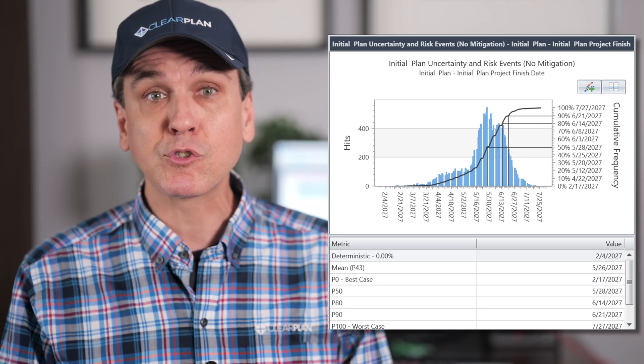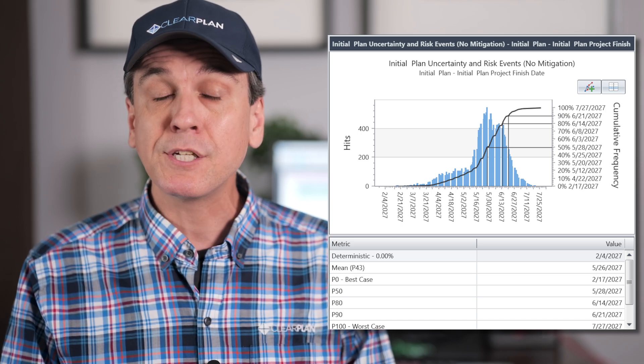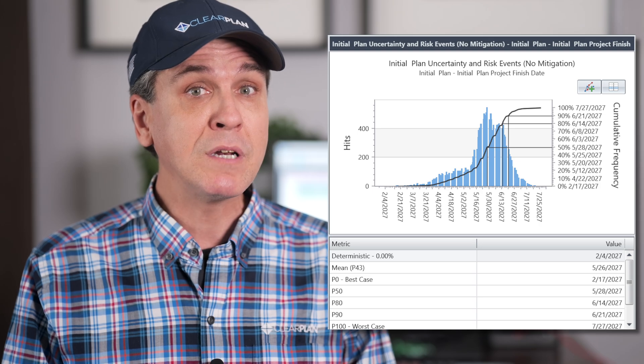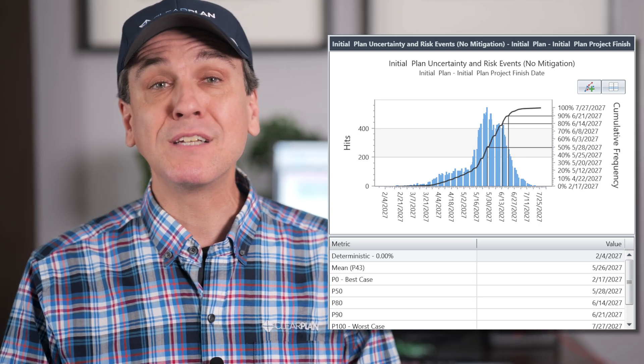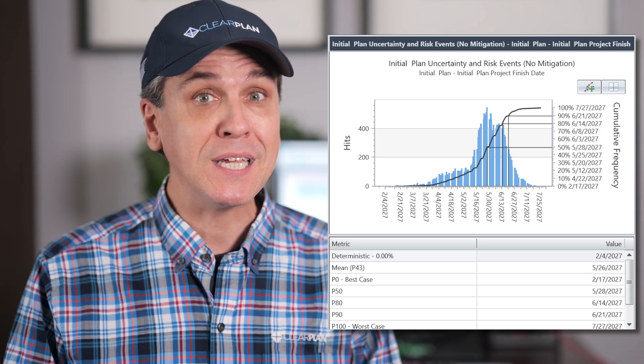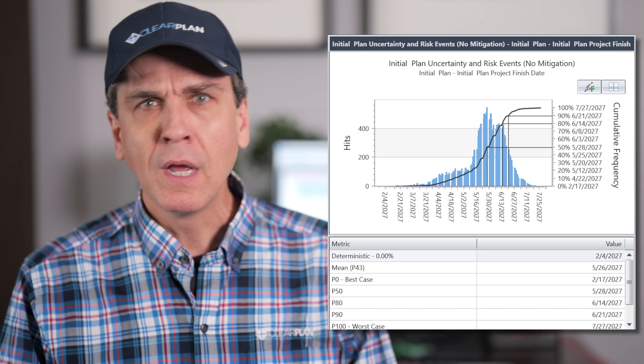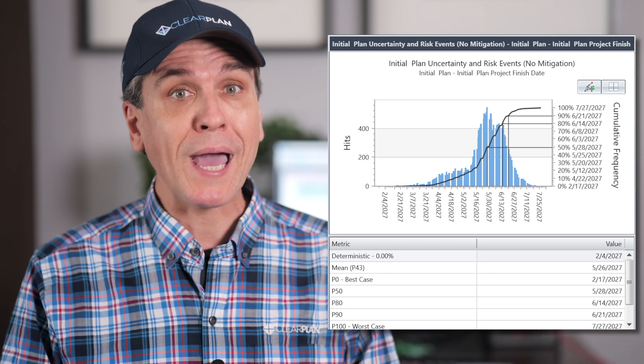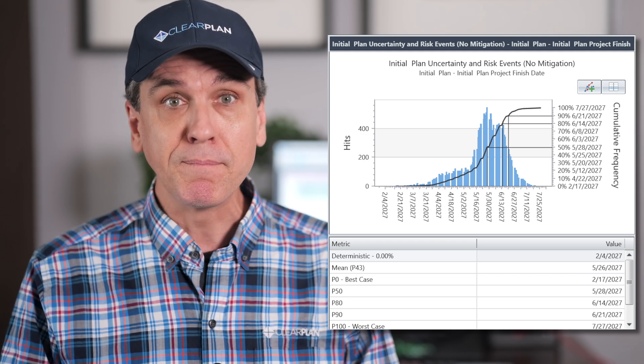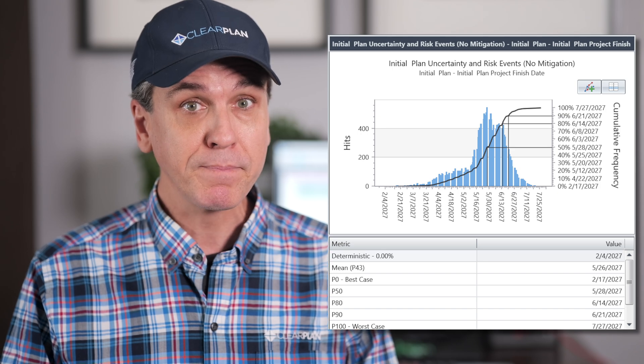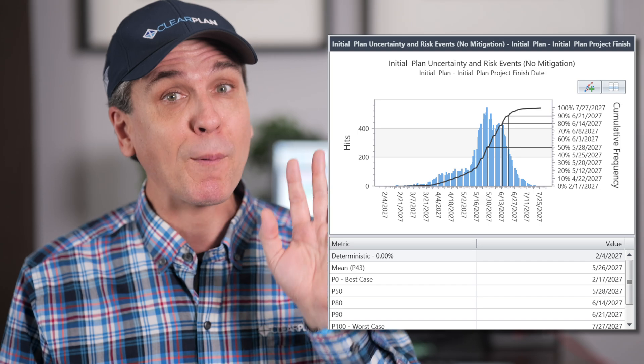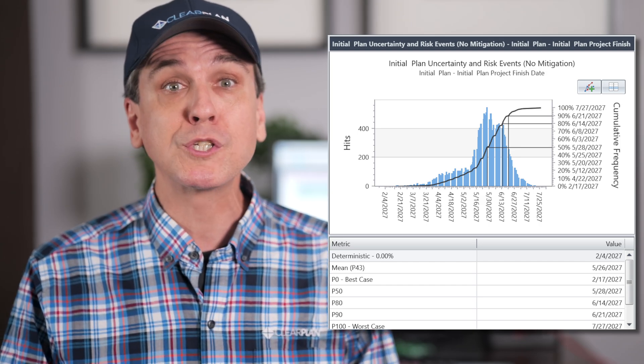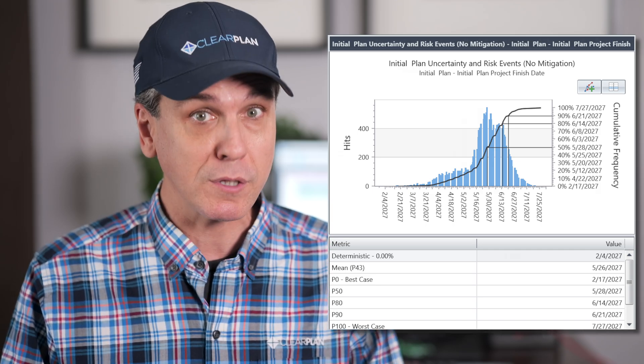If everything looks right, the project plan may need another look as it may be impossible to execute given the risk profile for your project. We would love to see a deterministic p-value somewhere between the P50 and P100 dates. This doesn't mean that everything is completely fine, but it means that if risk is managed and mitigated effectively, the project has a reasonable chance of finishing on time if the project culture is risk-aware and prepared to take the steps toward risk mitigation to prevent the predicted risk-driven delays.